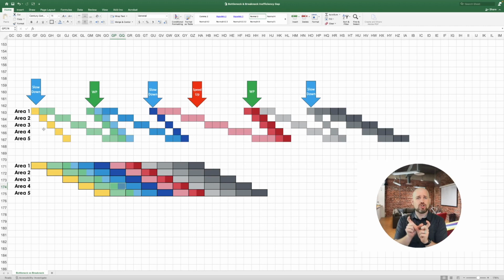So if we have those 2 cells that we want to get down to, and we're at 3, it could be that for that first week or that first block, we're outside or in a different location that is not right where the work needs to be installed. It could be stick framing elsewhere and then taking that assembly in and building it. It could be that we're building a certain run of duct, and we bring it into the building and then jack it up or whatever. I don't know. It really depends on the type of work and, logistically, can we make that work? All sorts of different things. But that is an option.